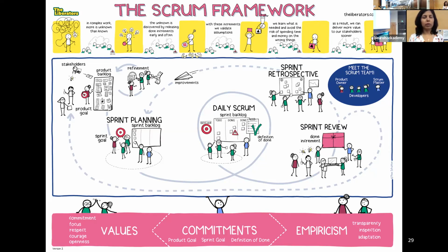And typically that number, if you think of your day-to-day work or software that you have created, is maybe no more than 5 days. If it's going to take you more than 5 days, there's enough unknown about it that you cannot accurately estimate it's going to be 7 days or 10 days. So an easy way to solve for that in these tools is to come up with Fibonacci estimates.